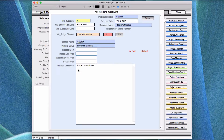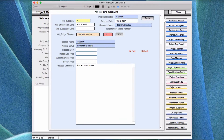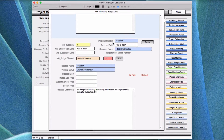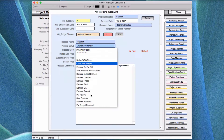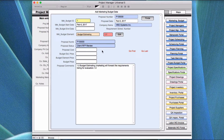The comments down here would outline what the client is doing as far as needing survey — for example, maybe he's doing one or two houses or a hundred. You might want to ask: if we do a proposed survey and it's lower than the bid you currently have, would you consider that being added into your project? That's the kind of thing you want to know up front before doing a lot of legwork to estimate those things. You're looking through the proposal to see what's missing. This is part of the presets — if you have a standard template or boilerplate, you can go through and make sure it fits the proposal, and if he's missing things, it's best to find out right at the start whether they're actually missing or were omitted for a reason.